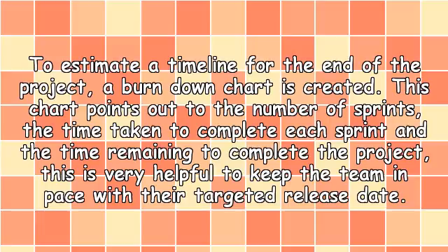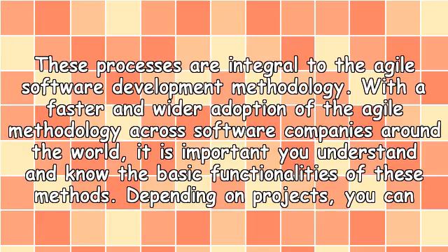To estimate a timeline for the end of the project, a burn down chart is created. This chart points out the number of sprints, the time taken to complete each sprint, and the time remaining to complete the project. This is very helpful to keep the team in pace with their targeted release date. These processes are integral to the Agile software development methodology.